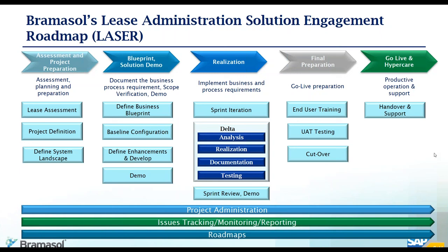So typically, based on complexity of the project, you're talking about 6 months all the way to 12 plus months on a project of this magnitude. And we have some accelerators and tools that will help to expedite the implementation roadmap or implementation process here. Okay, over to John.